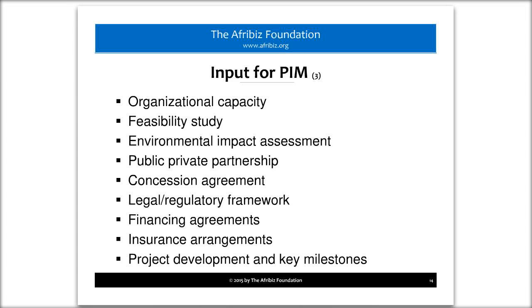You'll have insurance requirements. You have to have insurance on the property. You have to have insurance on the equipment. All of that is de-risking the project for people who are a part of it, whether it's yourself or the investors. And then, of course, you have to have a process and key milestones, and you have to have it documented. Anytime you update a project information memorandum, you update where you are. So there's always a section that says status. That's a simple thing that you should be able to do. That's pretty obvious.